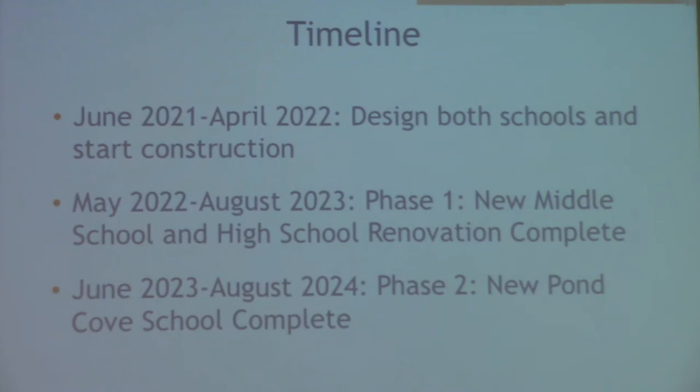August 2023, the new middle school would be complete so that you're occupying the new middle school for your fiscal year, your academic year in the fall of 2023. And then between June 2023 and August 2024, the phase two, this would be the demolition portion of the old Pond Cove, the build of the new Pond Cove school, that would take place to be completed in time for students to occupy the new Pond Cove school, lower school for a better term, in the fall of